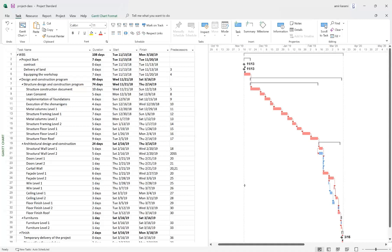For step one, you should open your MSP file and check that all tasks are defined correctly. As you can see, we categorized all the objects into different classes — for example, doors level one, doors level two, facade level one, facade level two, ceiling level one, level two — and their start and finish times are defined. We have a construction WBS here.